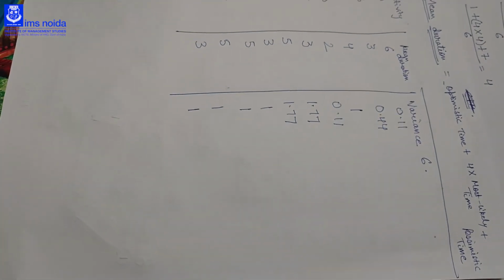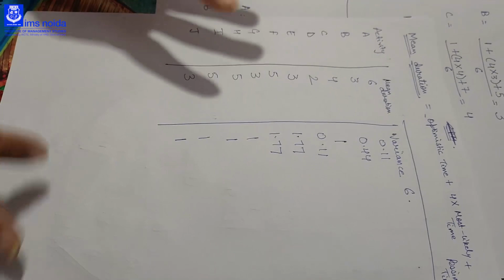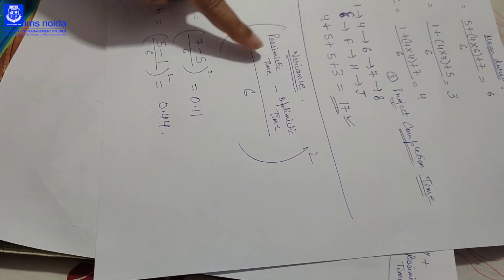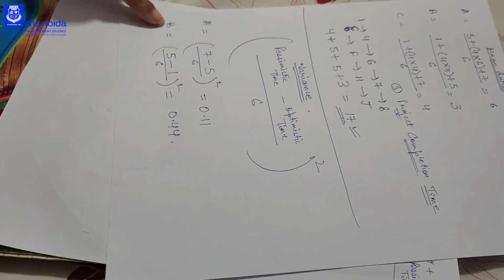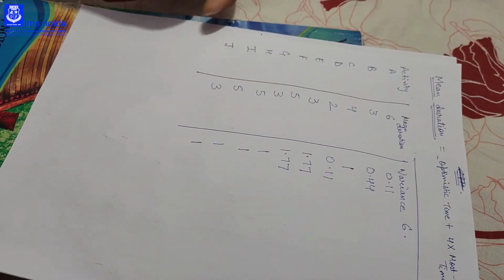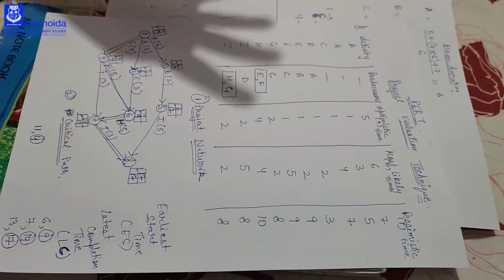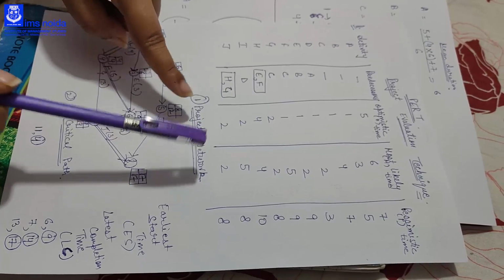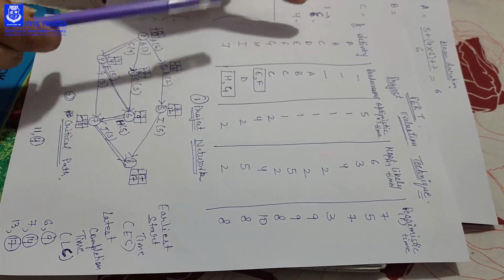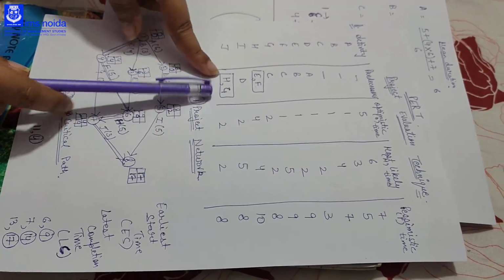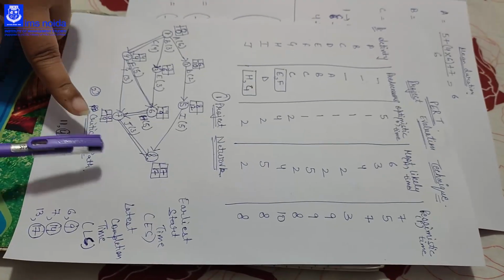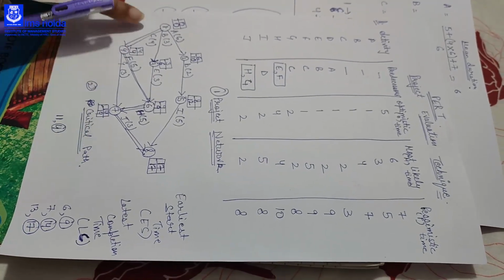Okay, I have calculated for all the activities. How we will calculate, I have explained here by giving the formula, and I have also calculated the variance of some activities. With the help of this, you can find the variance of every activity. So in PERT evaluation method, you get 4 things to calculate. That is the project network. You can make the project network with the help of activity and predecessors. Then you have to find the critical path. To find the critical path, you need durations.